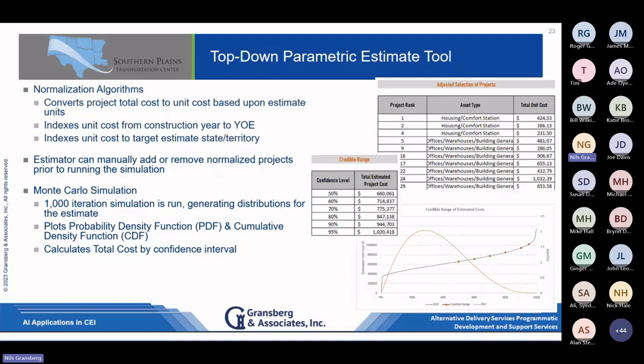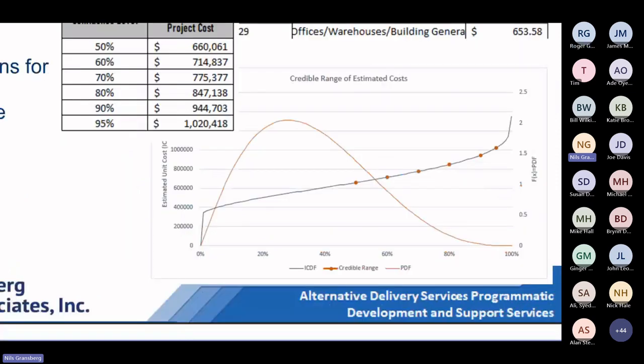And if I'm just looking at the shape of my density function, I'm going to prefer ones that are more normal, right? It's a uniform bell curve. I want less skewness. The more skewed either way that density function is, the less confidence I will have in it being predictive. There are different ways to quantify the level of skewness. Very, very easy determination: if it's between -0.5 and +0.5, it's essentially uniform. That's symmetrical data, which means that's normal.